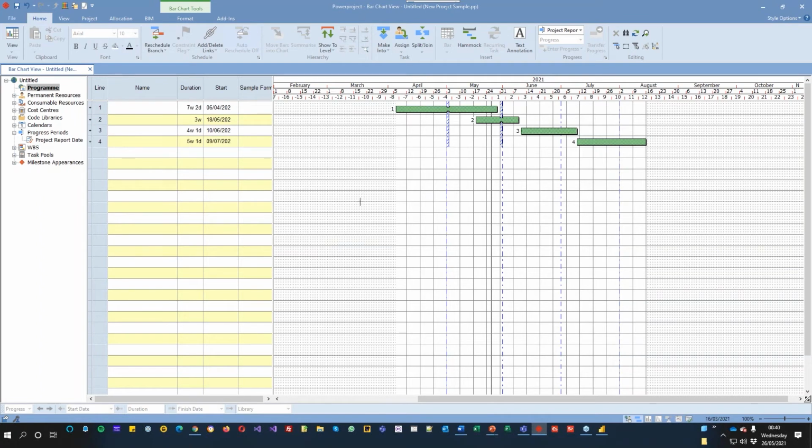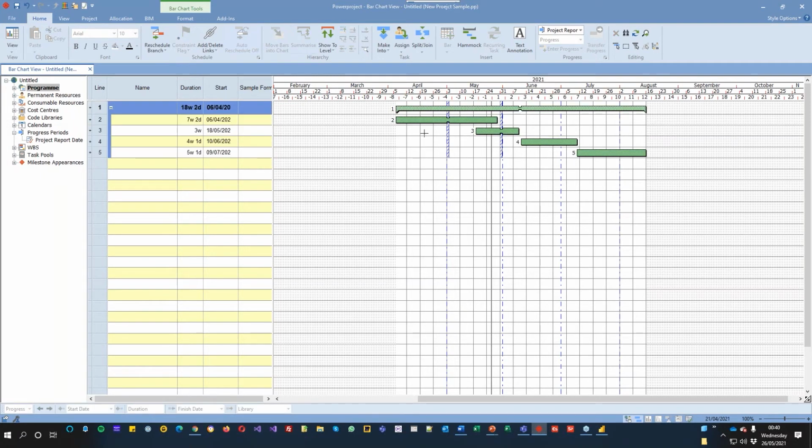So we have the default object, which would be whatever line you're looking at. But if I have this project here and I summarized it here, if I said summary, it would take the information from here. So an interesting formula you could say is, what's the duration of the task divided by the duration of the summary to give you the percentage equivalent of that task? If I had cost, what's the cost value of this task compared to the cost value of the overall summary?